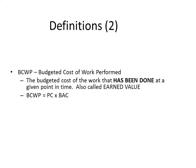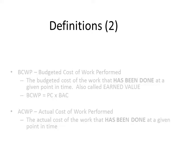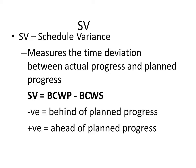Budgeted Cost of Work Performed (BCWP) is the budgeted cost of the work that has been done at any given point in time, also referred to as earned value. The formula used is: percentage complete multiplied by budgeted cost at completion. Actual Cost of Work Performed (ACWP) is the actual money that has been spent at any given point in time.